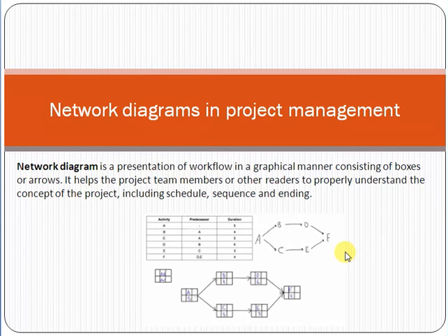Sequential activities means that once an activity finishes, only then the next activity will start. For example, once the development finishes, only then the testing will start. So this is an example of a sequential activity.